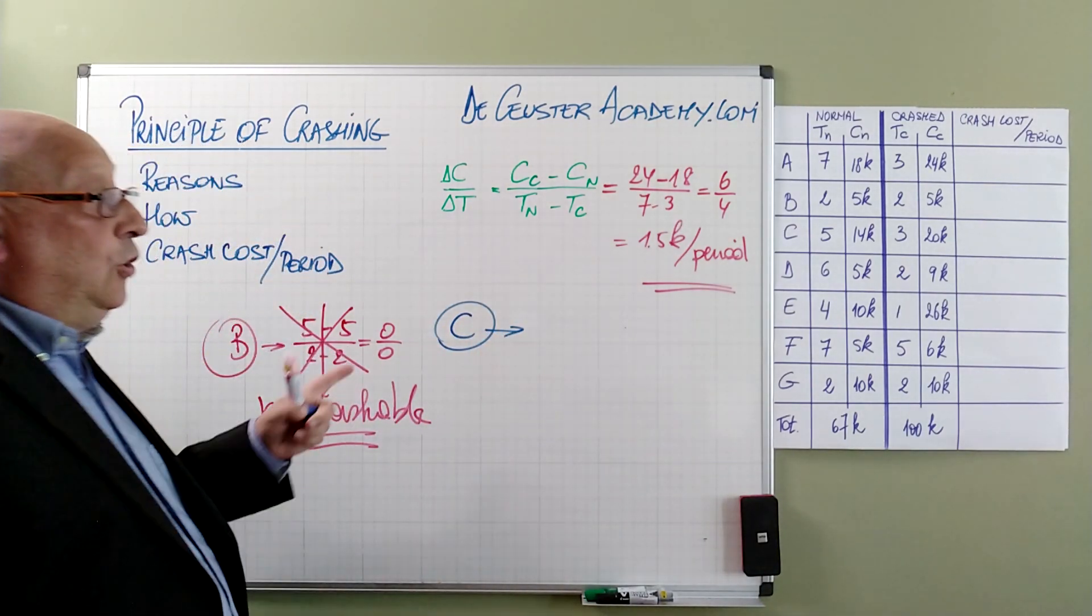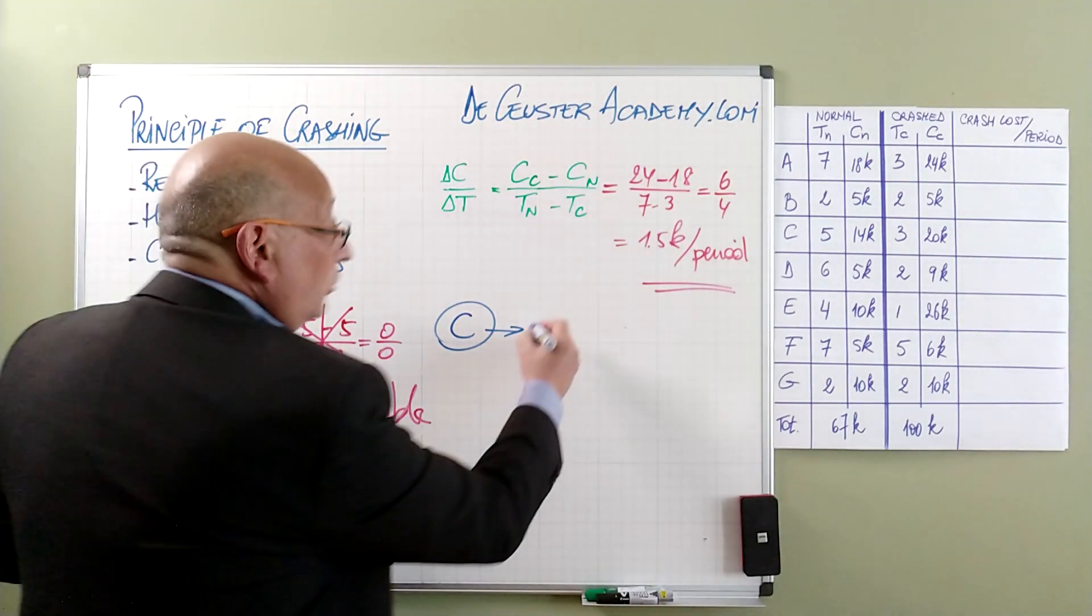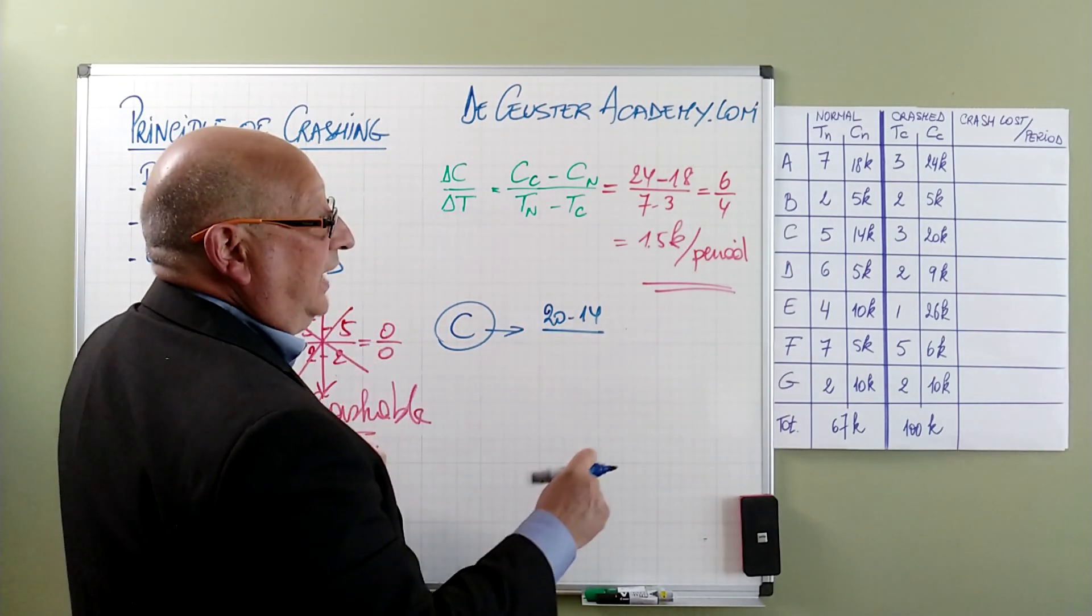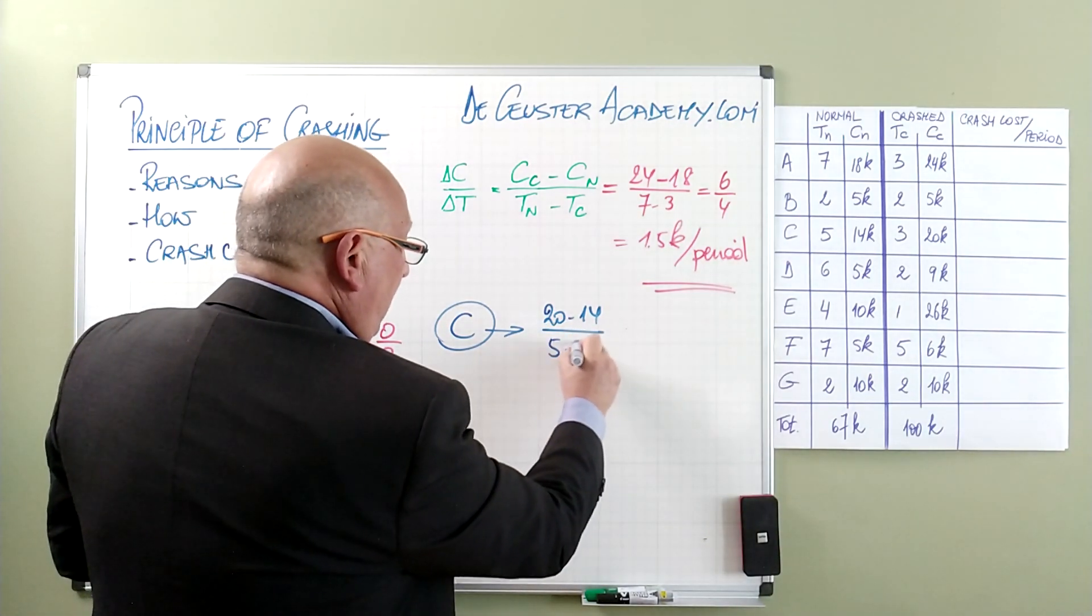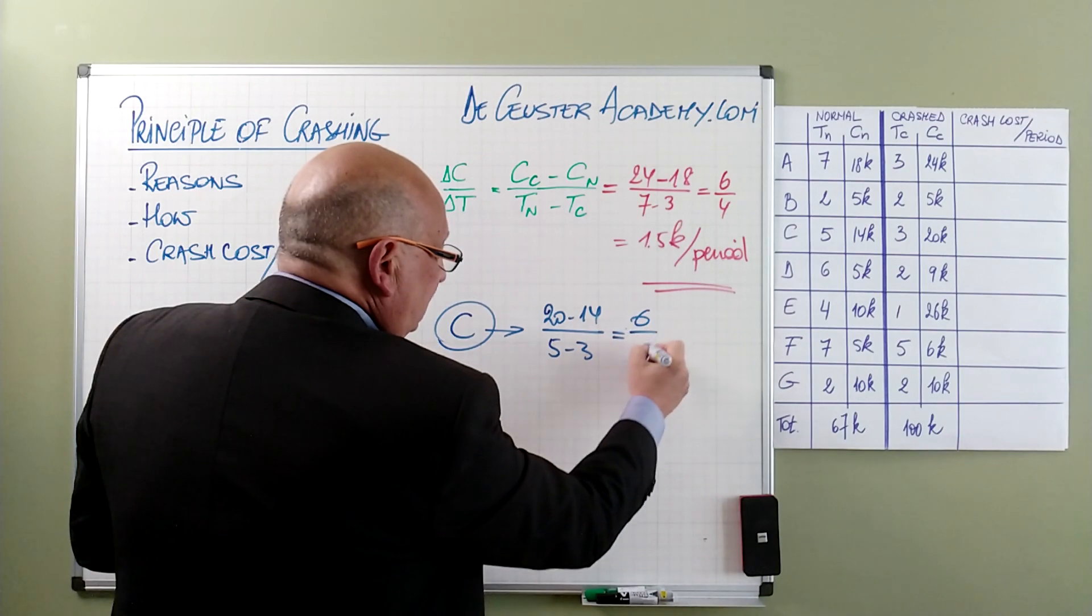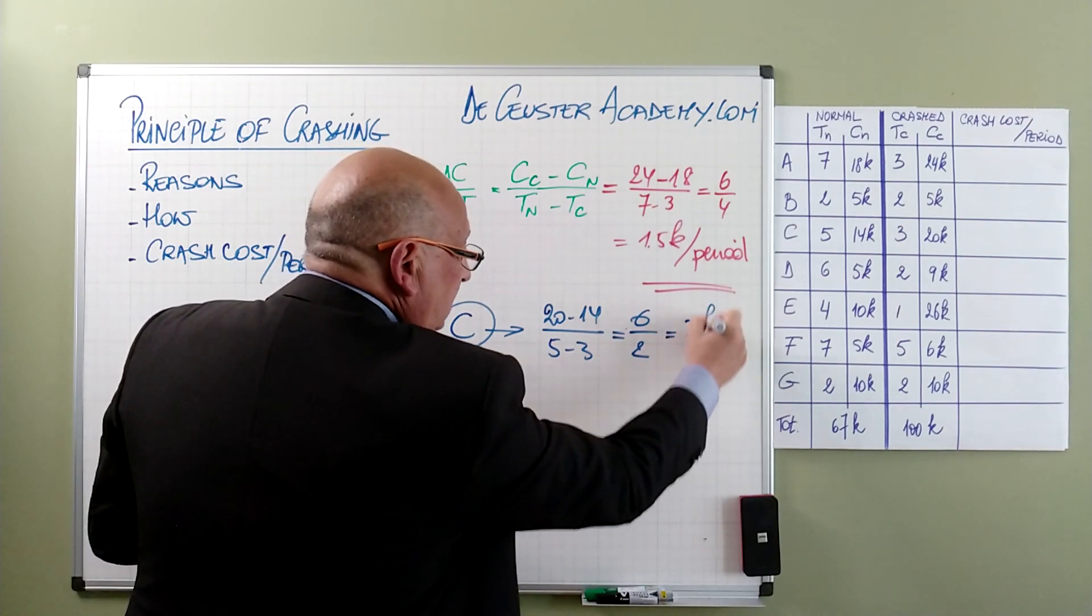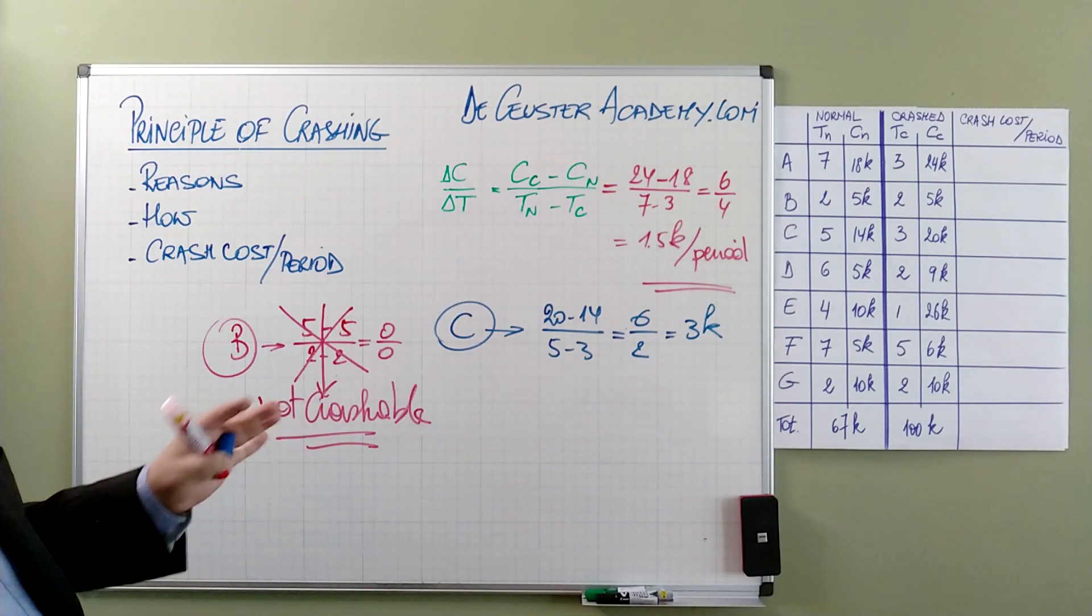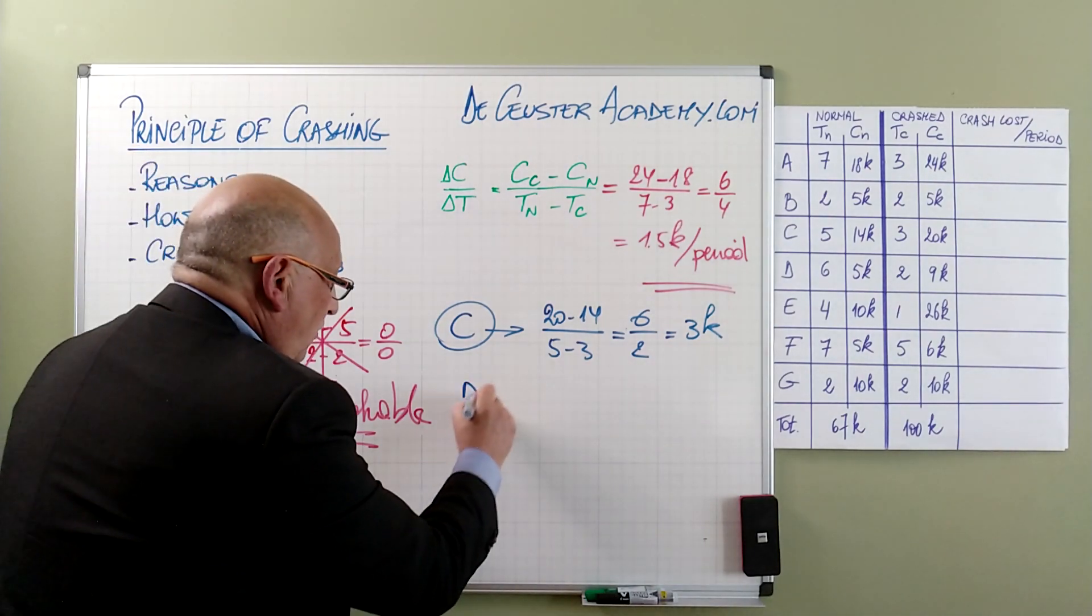For activity C, we find the difference in cost is 20 minus 14 divided by 5 minus 3, which is 6 divided by 2, basically 3K.